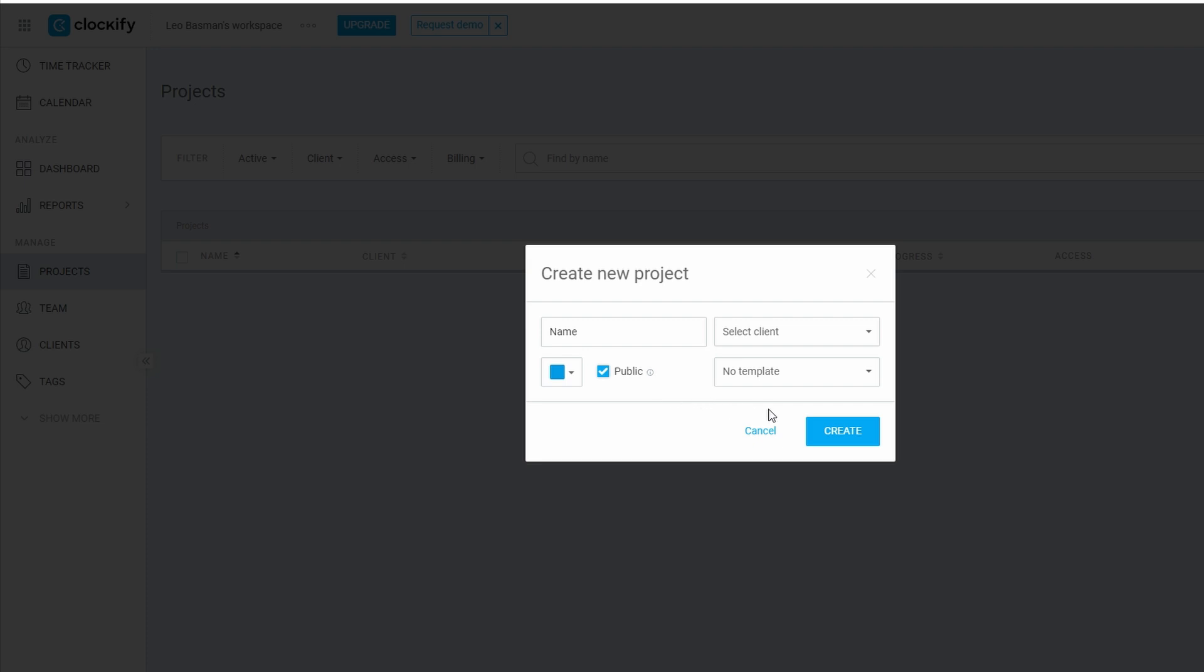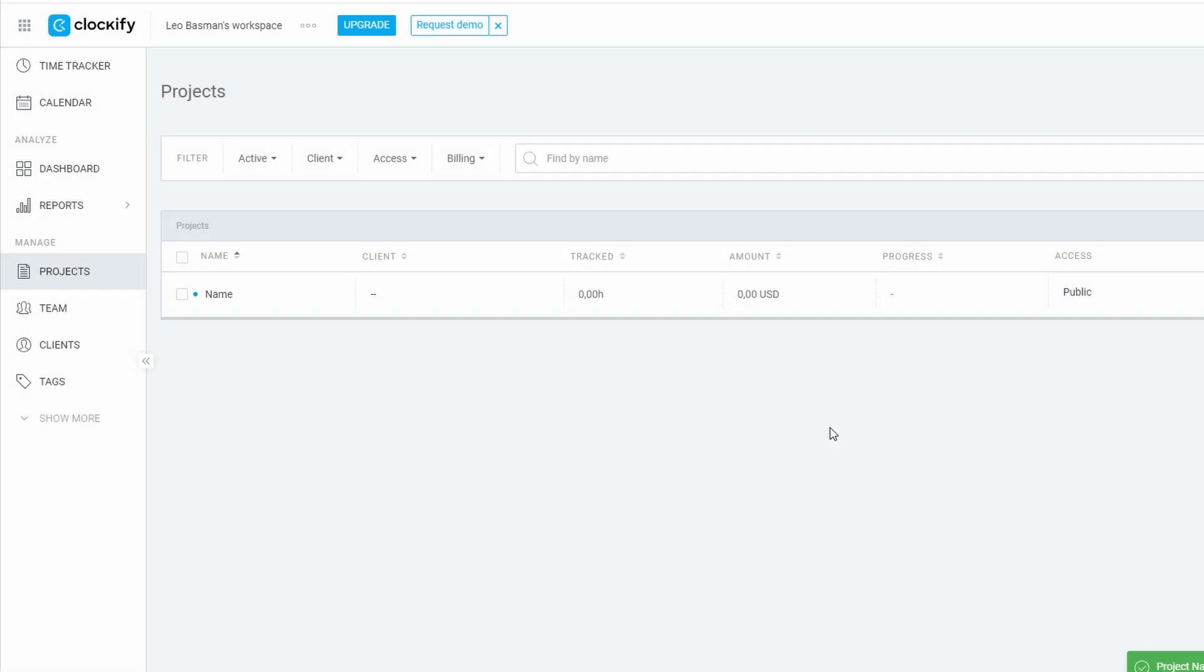If this project involves billable work, make sure you mark it as billable. You can also set the hourly rate for this specific project. Let's say you're charging $60 an hour for their website redesign. You can set that right here, and Clockify will calculate your total earnings as you log time on the project.